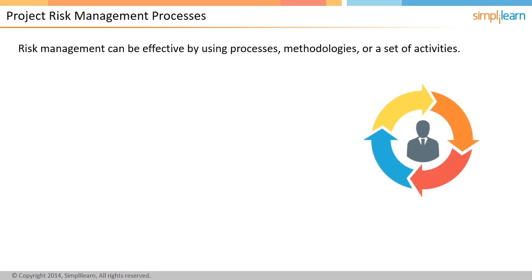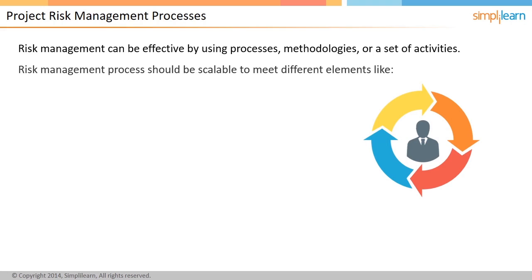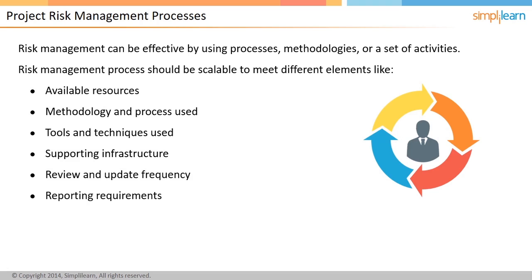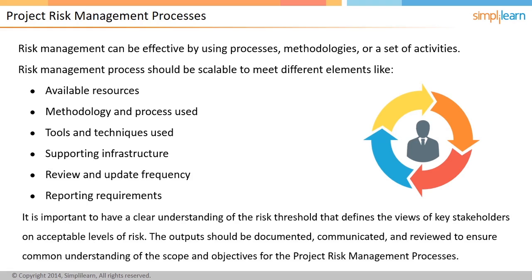You make risk management more successful, effective, or consistent by using processes, methodologies, or a set of activities. However, before using these processes, you should keep some points in mind. The risk management process should be scalable to meet different elements like available resources, methodology and processes used, tools and techniques used, supporting infrastructure, review and update frequency, and reporting requirements. It is important to have a clear understanding of the risk threshold that defines the views of key stakeholders on acceptable levels of risk.